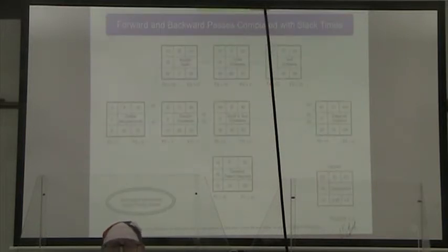Okay, well, in fact, all right, so look, right through here, we have no slack. And assuming we have done a good job of estimating times, that means we have to be able to define requirements within our 10 time periods. We have to be able to design the hardware within our 25 time periods. We have to be able to build and test that hardware within our 50 time periods.